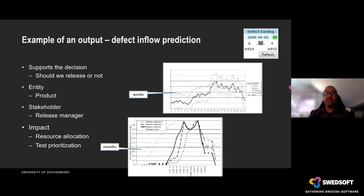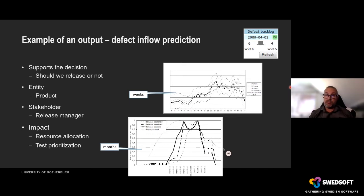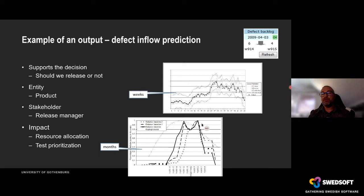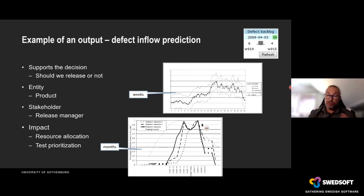At the beginning, we were predicting product performance in terms of number of reported defects during development. When we showed these predictions to system owners and product managers, they took those predictions and reprioritized their testing resources to address a second peak. What happened was that the predictions were really bad — not because we were wrong mathematically, but because the organizations managed to act upon that data and do something about it.